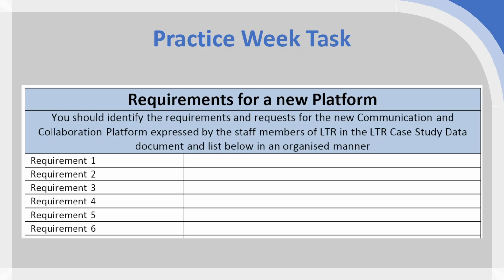Part of the initial work that has to be done in a project, part of the define stage, is gathering the requirements from all of the different stakeholders. So we have to understand what requirements mean. At this stage, you may choose to find and recommend a system that meets the requirements, or you may choose to recommend a system that doesn't meet all of them but satisfies them as best you can. That's because different stakeholders may well have requirements which are conflicting or contradictory.